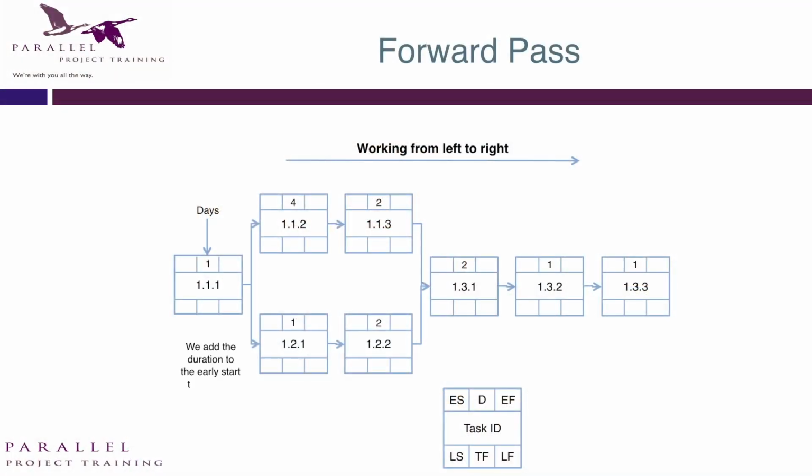So that's what we're trying to understand with a precedence diagram. So we can work that out analytically. The way you do that is you put 0 for the first date, 0 plus 1. So it's going to start week 0, it's going to take a week, so that means it'll be finished by the start of week 1. So when can the next task start? The next task can kick off the beginning of week 1, the last 4 weeks, that's going to finish week 5. So we can work through till the point where we know that one activity is going to finish week 7 and the bottom activity is going to finish week 4.